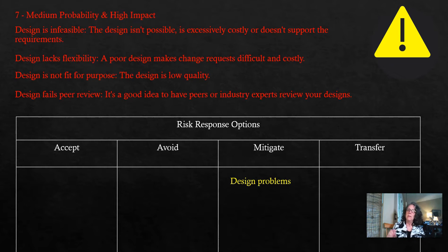Recall that no one in the vendor organization really understood that the data relationships that served the existing system were very different from the ones in the system that the vendor was selling. Because those underlying designs were so drastically different, the gaps being identified in those gap analysis meetings were not just a functionality gap, they were a really fundamental design difference.